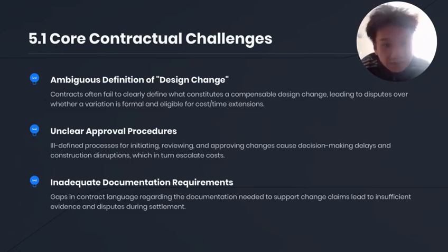First, design changes create three major control challenges. The first issue is unclear definition of design change. In many DB contracts, it is unclear whether small adjustments, major design refinements or function updates are counted as a formal variation. Once this boundary is unclear, disputes arise over whether the contractor is entitled to claim